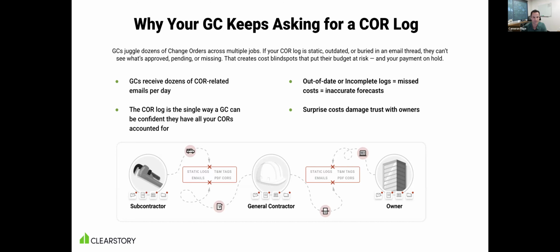So as a GC, when we get that window of time to sit down and review change order requests, so hopefully we can get them approved, change orders cut to you guys, or package them up and put them in front of our client, our first step is usually just simply doing an audit of, do I have everything? And that's why the change order log is so important. TJ, I don't know if you want to add anything to that.